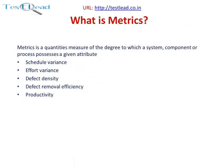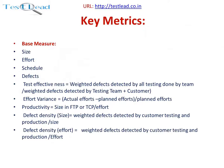What is a metric? A metric is a quantitative measure of the degree to which a system, component, or process possesses a given attribute. Key metrics include: schedule variance, effort variance, defect density, defect removal efficiency, and productivity. Base measures include size, effort, schedule, and defects. Test effectiveness equals weighted defects detected by all testing done by the team, divided by weighted defects detected by the testing team plus the customer.